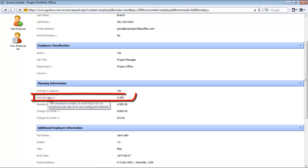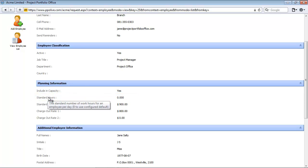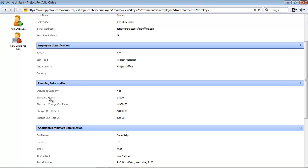The next field is the standard hours. This field allows the user to capture an exception to the standard hours captured in the system configuration. For example, if this employee works four hours a day instead of eight, which is the default set in the system configuration, the four hours can be captured here on the employee's record. If it's zero, PPO will use the standard hours as in the system configuration.